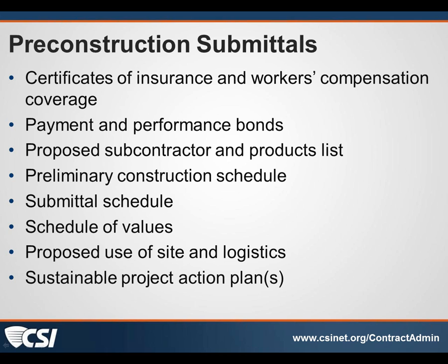Kevin O'Brien comments, I would suggest that the contractor's bond and evidence of insurance are not submittals, quote unquote, because they are typically not being reviewed by the architect or engineer and are obviously not being stamped with the submittal review stamp. The AE should not review insurance because his professional liability coverage does not include dispensing insurance advice. We require these documents be submitted. They come to us and we forward those on to the owner, and as I mentioned earlier, CSI and AIA does recognize those as pre-construction submittals.